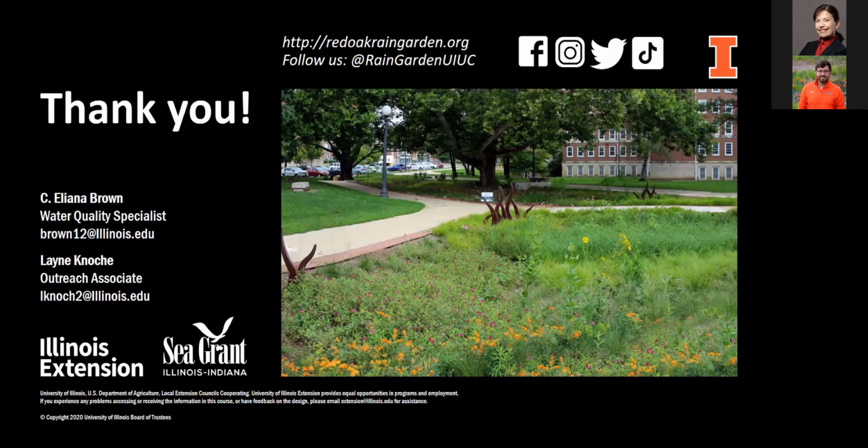Our first question is from Sherry, and she is wondering if all of the layers were planted at the same time. That's a really great question, and one that we actually adapted as we were going. As the landscape designer, my hope was to get all of the ground covers installed first, and then come in with the structural layer and then the seasonal layer. We started off that way, but it didn't work all that well, and we had to adapt. By planting all of the ground covers first, we made it difficult to move around because they were so densely planted. So we ended up,